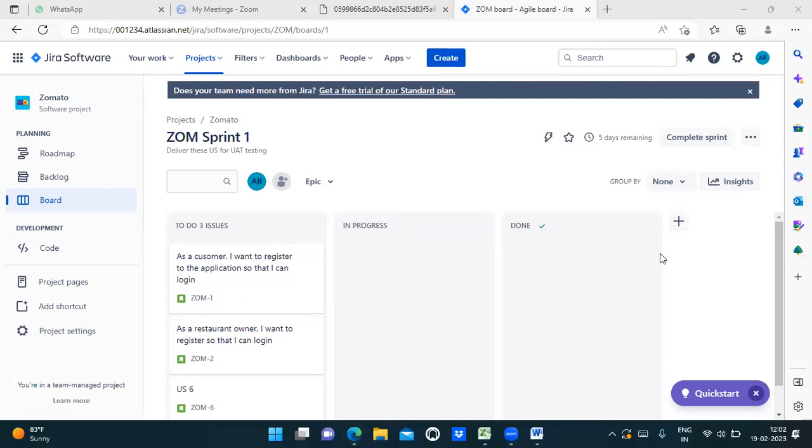How do we manage a change request if it is received during the sprint? You will add it to the product backlog. Actually, the process is the same, just that you will not add it to the sprint. You'll add it to the product backlog. So after adding, does that mean it will be managed in the next sprint?